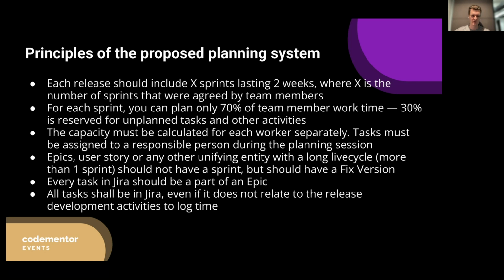an issue type in Jira that could include several or not several, that could include tasks and any other activities. So it could be a task or test execution, aka test running, and any kind of other activities or even bugs, just to link everything and know what is going on with this particular feature. You may call Epic a feature and it will be completely useful.